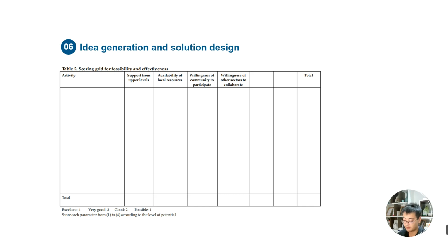Refer to the main causes in the problem map and the list of ideas and categories, and define the main courses of action or strategy. For example, to reduce infant mortality, the strategy will have two aspects: improving child care and improving maternal care. Then draw a solution diagram similar to the problem diagram.